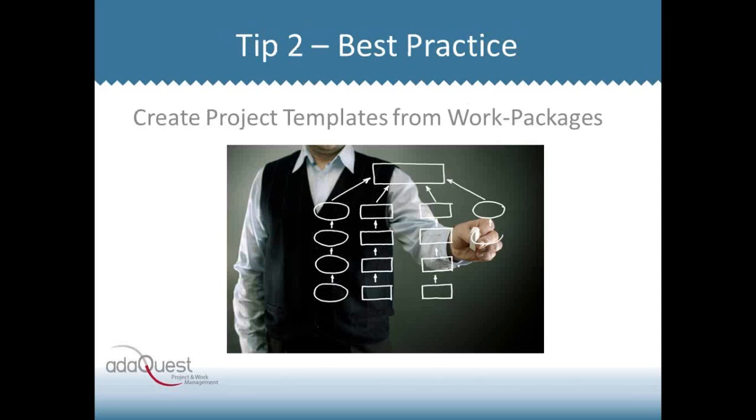So let me give you another tip here. Now, we've talked around about it, and let's make it more formal. Let's say exactly what it is. The tip here is to take those pieces of your project plan, which are highly repeatable, non-unique, and make those what we call work packages, staying in line with PMI terminology here. These are the smallest repeatable, estimatable, and tracking capable sets of tasks.